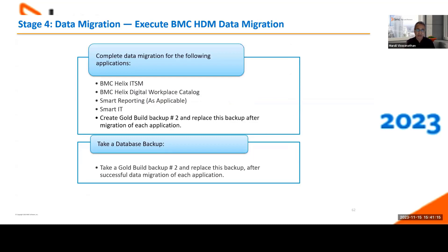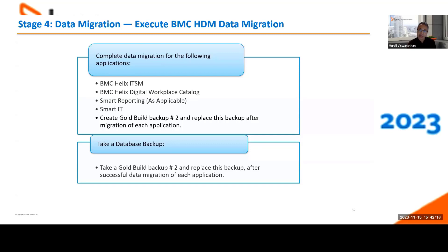The HTM tool supports ITSM, Digital Workplace Catalog, Smart Reporting (as applicable), and Smart IT. At stage three during development activities, you take golden backup one. Now you complete your data migration for all these products — and we encourage you to take golden backup two after completing the ITSM migration before running Digital Workplace Catalog migration. This gives you a good starting point. If something goes wrong during Digital Workplace Catalog migration, you have a backup to restore to. We strongly encourage taking backups after each product migration so that at the end you have a backup with all data migrated.